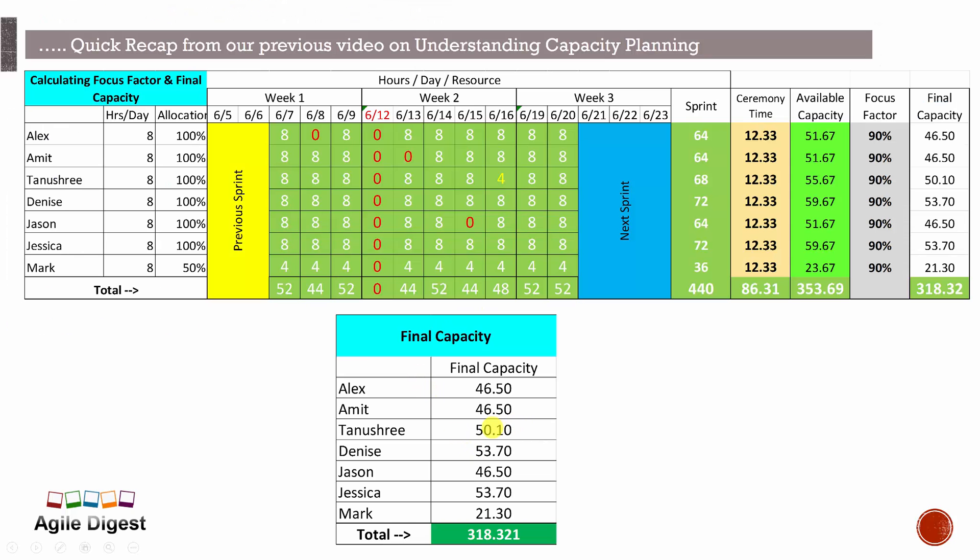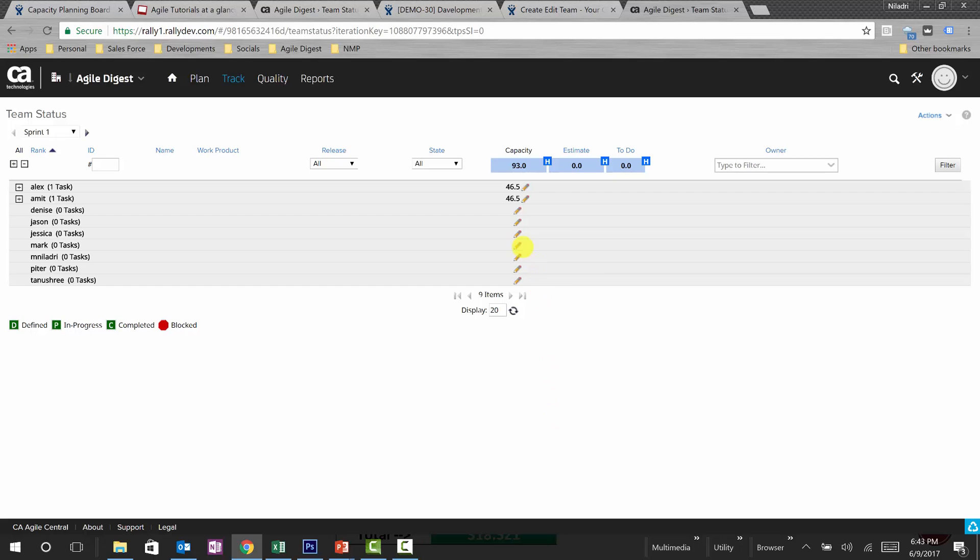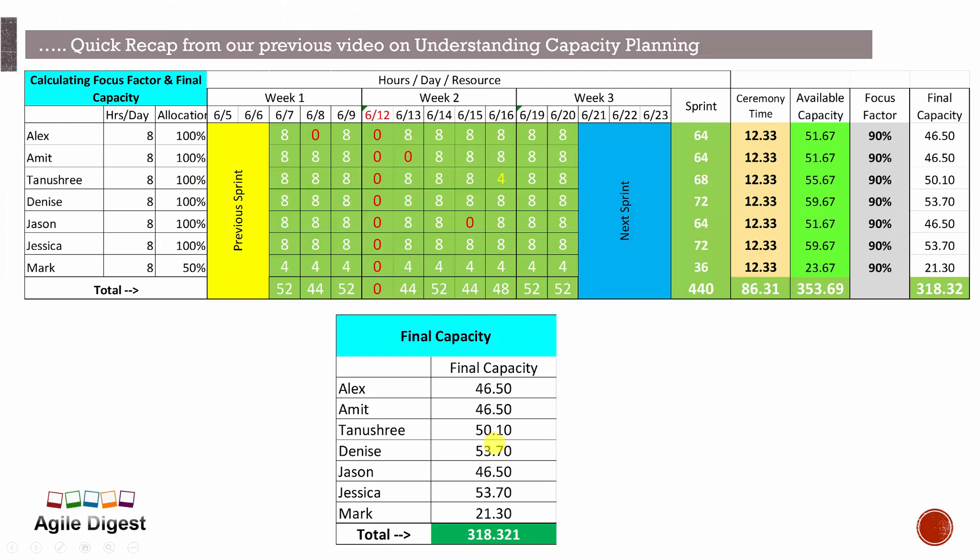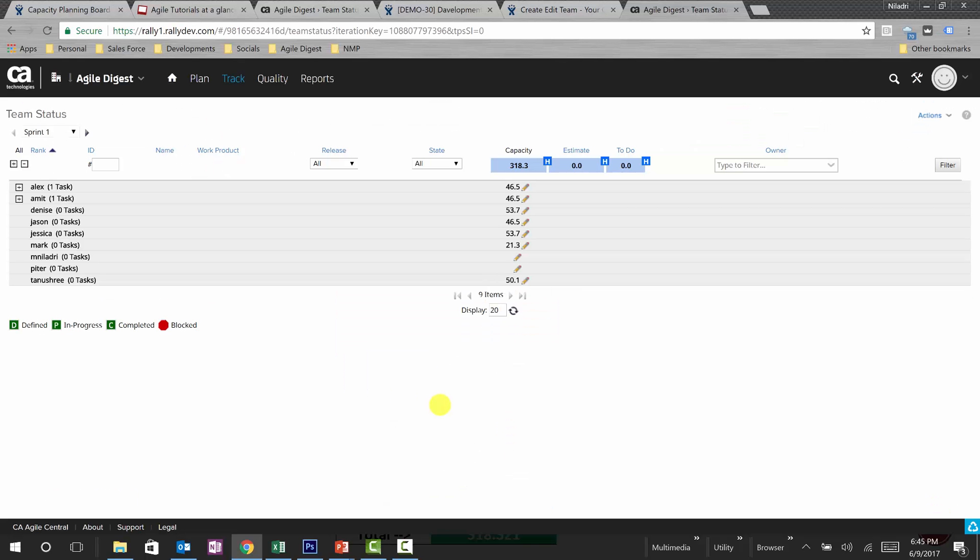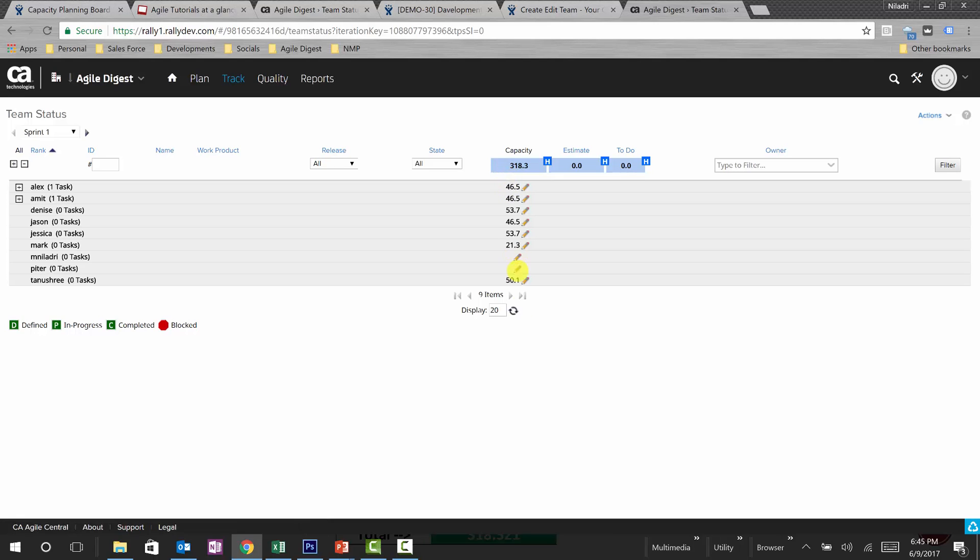Then I have Tanushri, it's 50.10, and similarly in that way we'll be putting all the hours. Okay, we are not marking Nila3 and Peter just because we are assuming Nila3 is the product owner and Peter is the scrum master, and we don't plan capacity for them in assumption that scrum master and product owner don't put their effort in construction.